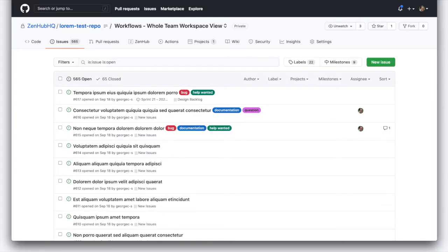In addition to being the best place to manage everything to do with building software, GitHub gives you a place to keep track of the things that you're going to get done. It's pretty simple — it's a list view. You can filter it, there are labels that allow you to organize work, you can assign issues to people, and there are milestones to group work together. Most people tend to use milestones to represent their sprints. And there are two states: open and closed.